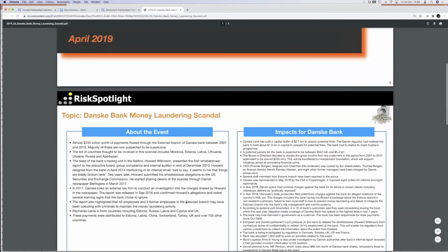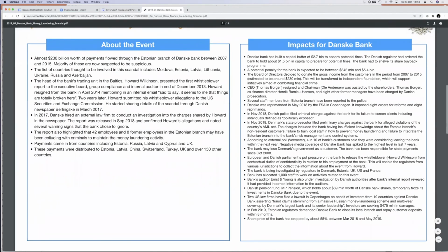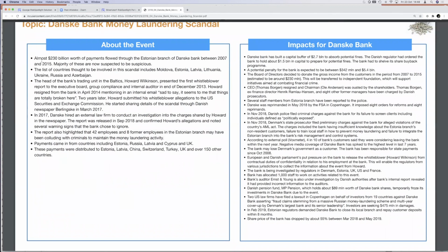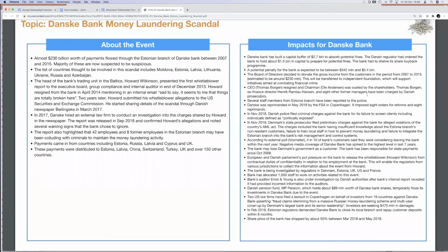As part of that, we analyze that loss event in as much detail as possible. We ask what happened in the context of that event, and what were the different impacts. These are financial, reputational, business impact, people going to jail, court cases, and we arrange them in a timeline so that you can easily see how the different impacts of that incident have evolved. And then you get ideas of all of these different numbers, which can be very helpful when you're doing your risk assessment.